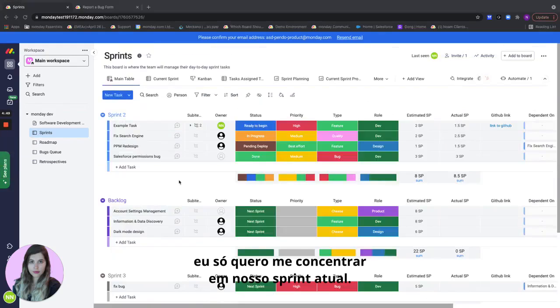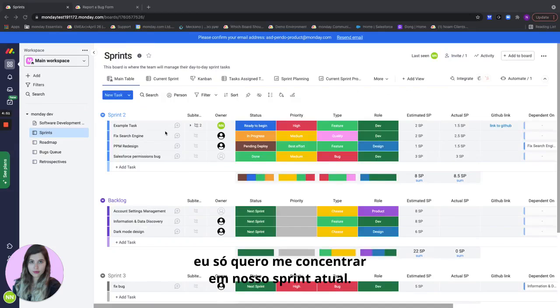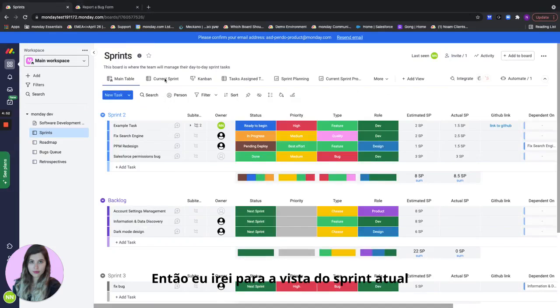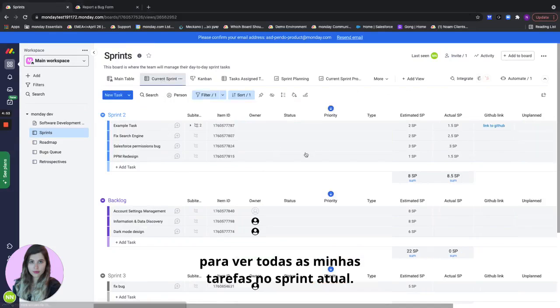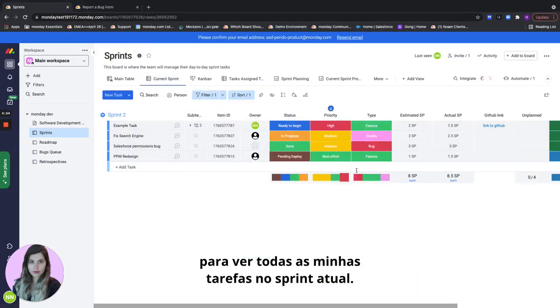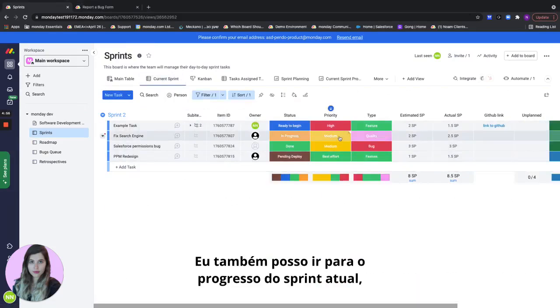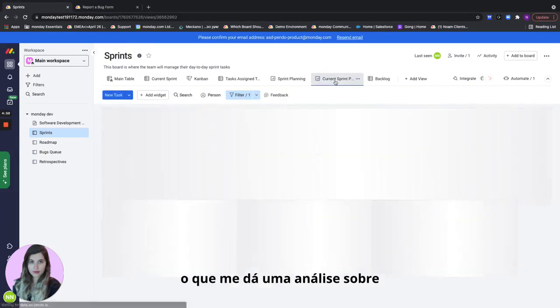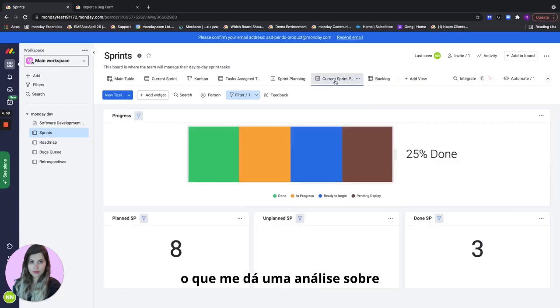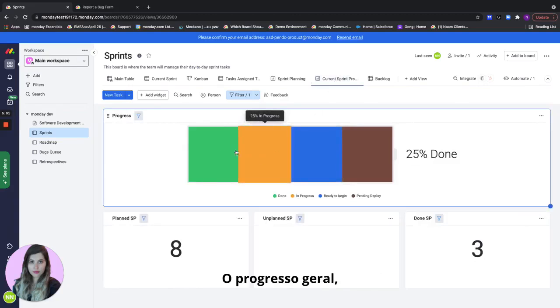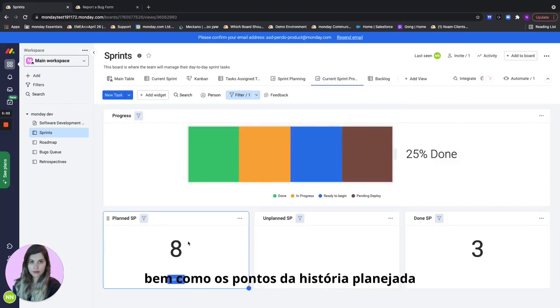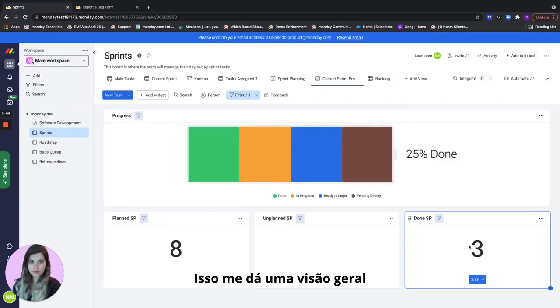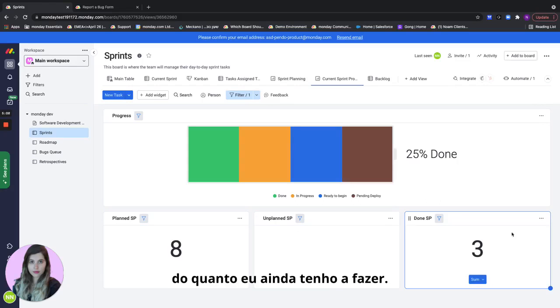So what if right now I just want to focus on our current sprint? I'll go to the current sprint view to just see all of my tasks in the current sprint. I can also go to the current sprint progress which gives me analytics regarding how I'm doing on this sprint, so overall progress as well as planned story points and the done story points, and that gives me an overview of how much I have left to do.